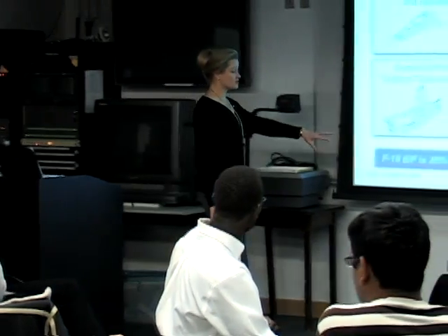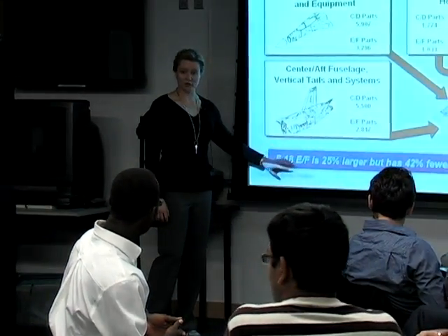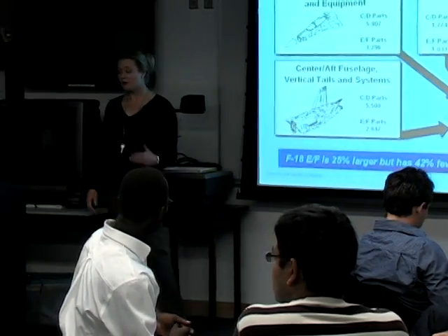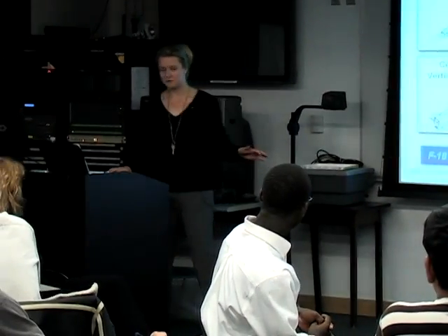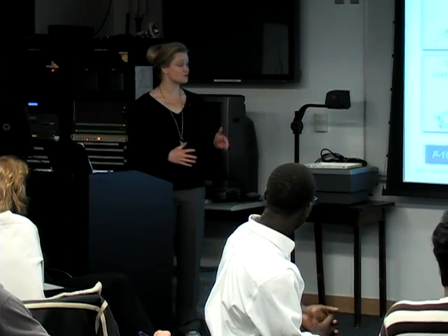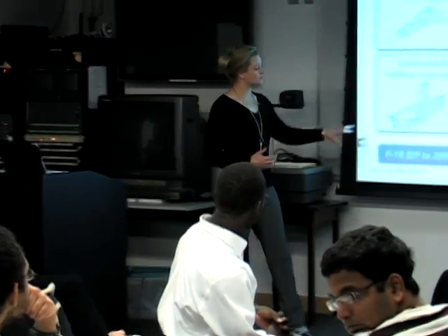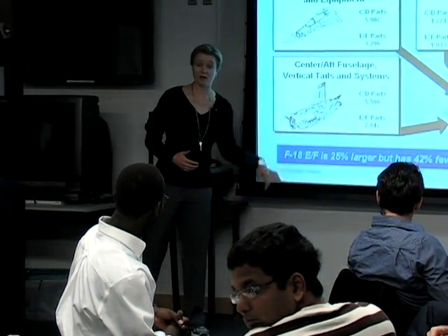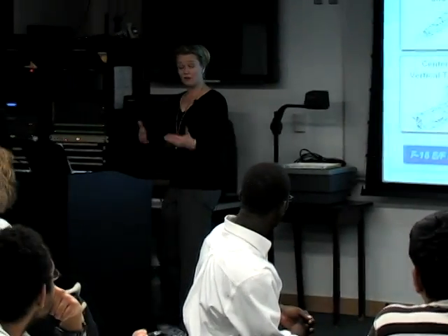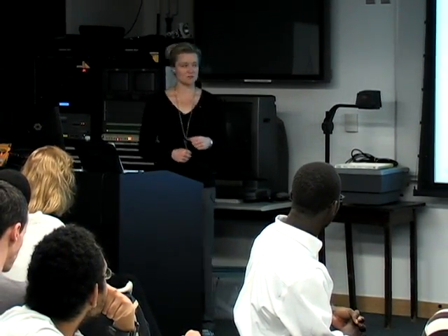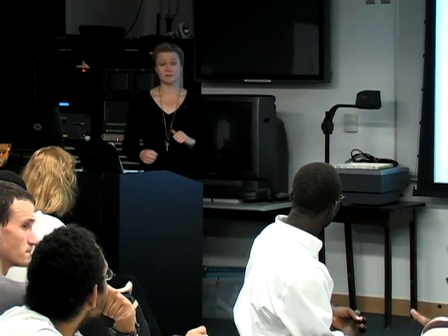Yes, so there certainly was a lot of engineering cost to redesign the plane. And there was an interesting arrangement between this company and the government. There was, if you would call it, cost-saving sharing or profit sharing that went on. So the company was incentivized and rewarded for keeping costs down. They didn't have to give all that savings back to the government. They didn't get to keep it all either, but they got to keep enough that it was an incentive for them to actually meet these objectives.